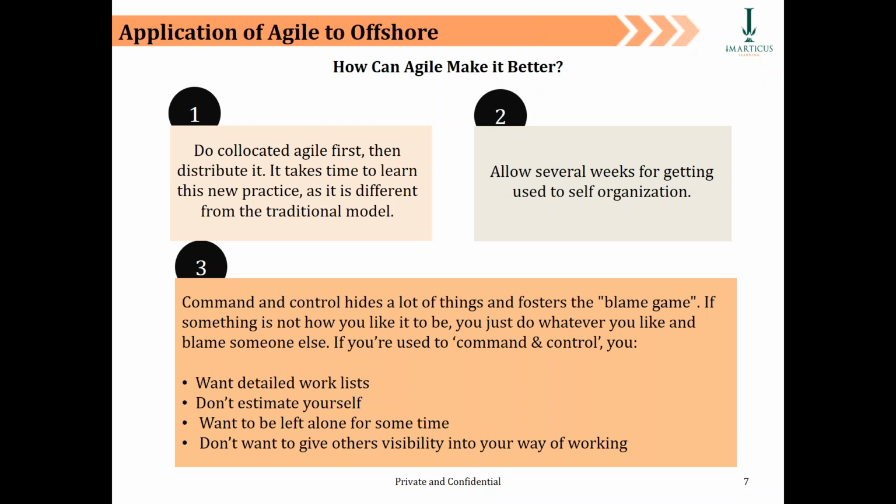First principle: do co-located agile first and then distribute it across different geographies. It takes time to learn this new practice as it is different from a traditional model. So please give some patience, some incubation and time to the project teams to make sure that they are enabled enough to work in a suitable agile perspective.